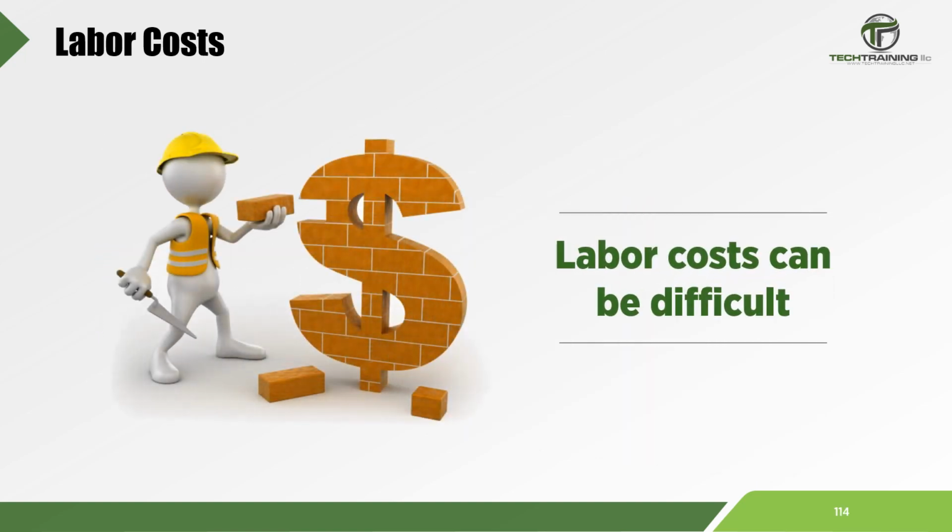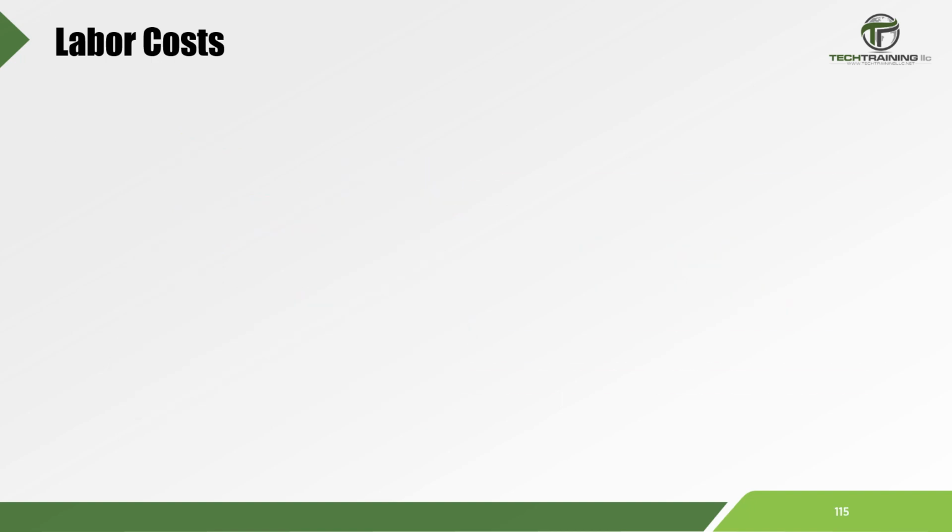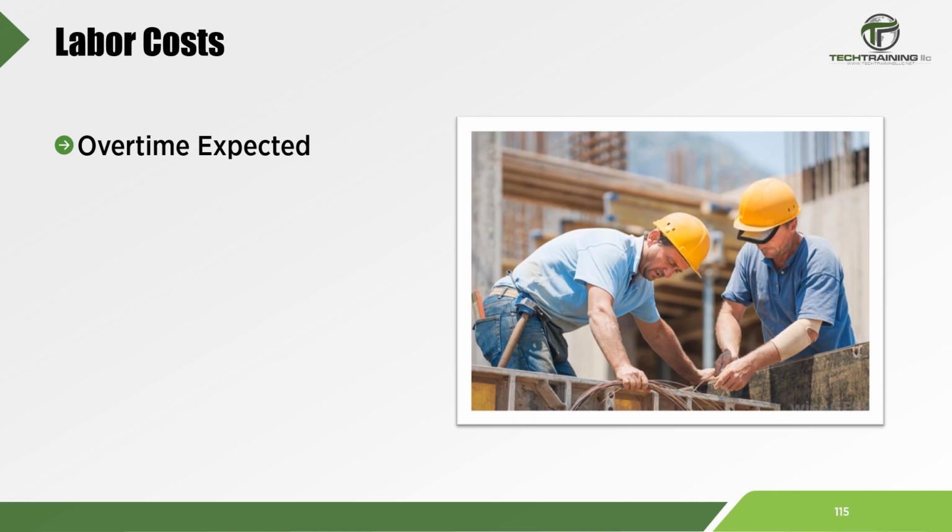Labor can be a difficult item to price because wage rates and crew productivity must be considered. We will discuss this in a moment. However, some of the items that must be considered by the estimator include amount of overtime anticipated. Will this be a working day job, or will work be performed on nights and weekends?